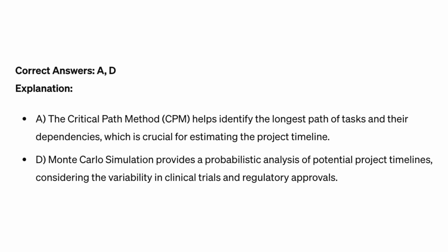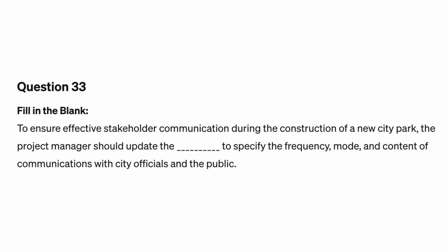Correct answers A, D. Explanation. The critical path method (CPM) helps identify the longest path of tasks and their dependencies, which is crucial for estimating the project timeline. Monte Carlo simulation provides a probabilistic analysis of potential project timelines considering the variability in clinical trials and regulatory approvals.